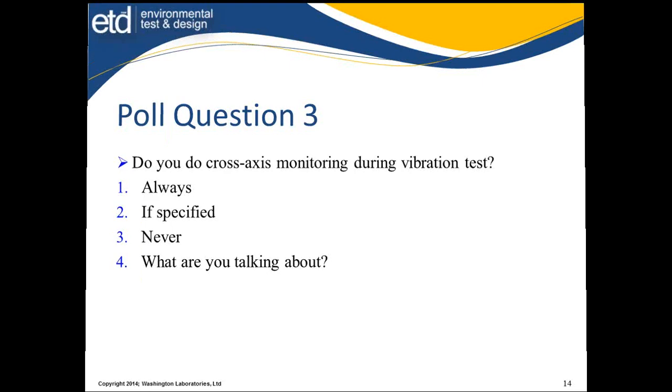So we should take care of this. Never should we first hear about a project the day before it's needed. Nobody thought about it when they did the job or started the design process, 4 months ago. It should have been brought forward at that time. Prepare your equipment, your UUT, your support equipment, everything needs to be prepared. Do you have the cables that will reach out to the outside of the chamber?